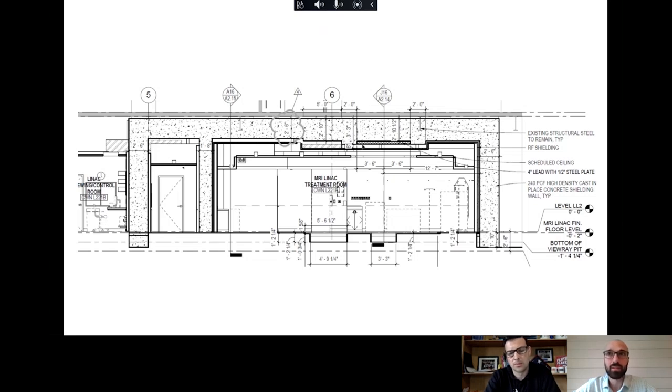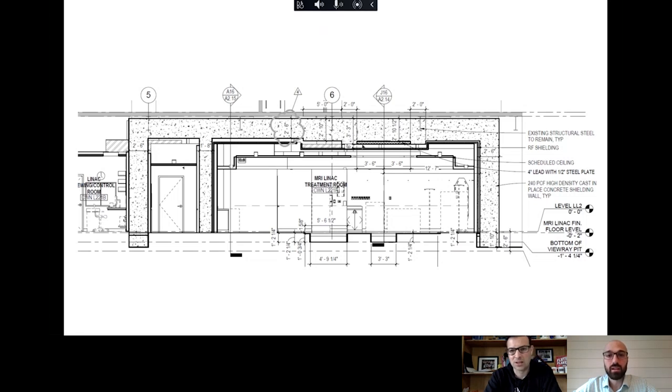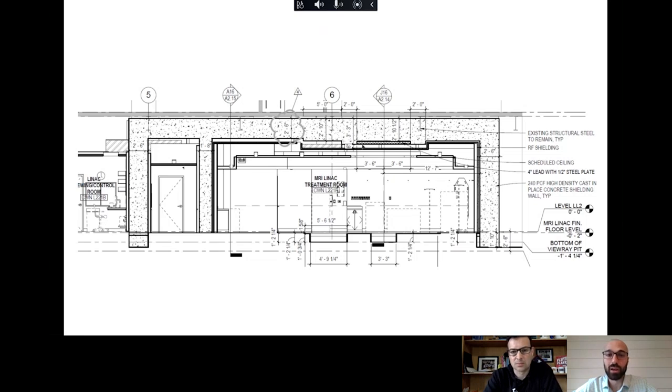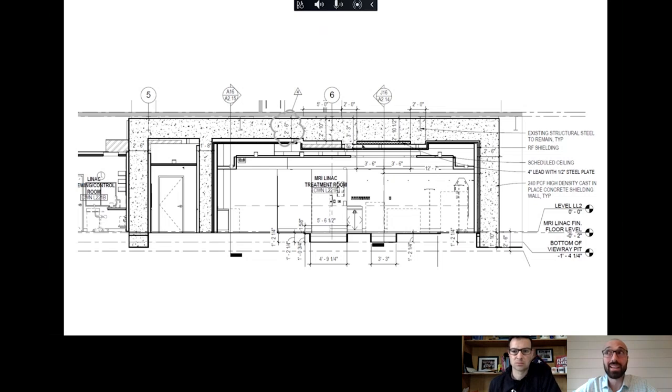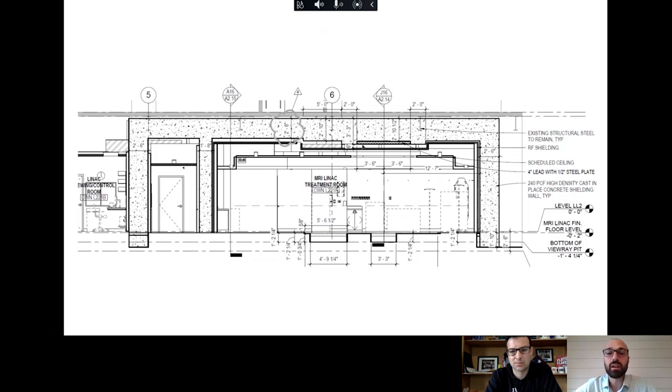There is zero chance for this not, there's no option for this not to work. So you had to actually test all these mixes, simulate the condition. You can imagine what kind of problem we would have had if you only get one shot at this, if we had placed this lid and we didn't hit the weights. Because at that point, we had some options, but they would have been painful ones in order to supplement the density of the concrete. If we had to add shielding, it would have been another hurdle to overcome. So we really had to make sure we got it right.